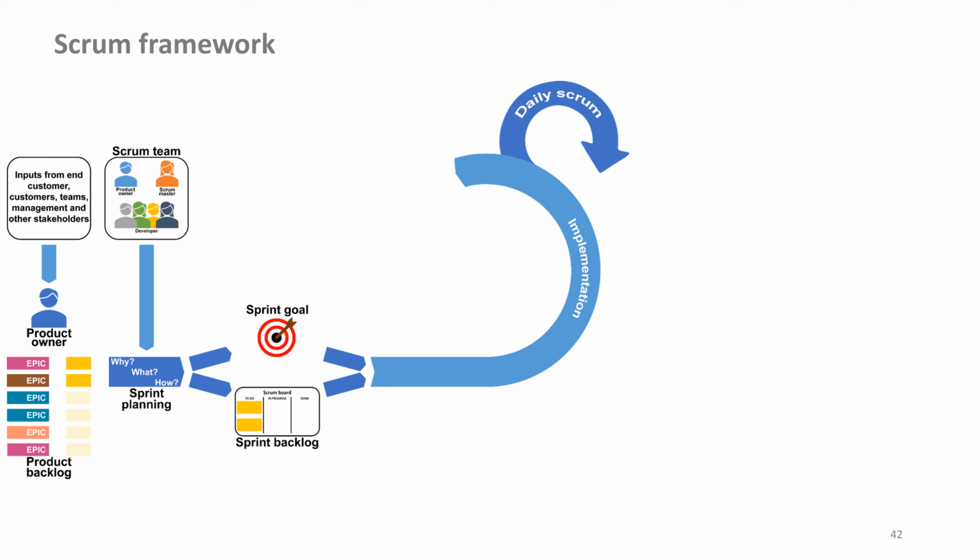There are cases where, for example, an urgent bug fix needs to be included. For this reason, the sprint must not be terminated. It must be evaluated whether the sprint goal still makes sense. Individual work packages in the sprint backlog can be exchanged for work packages of the same size. In practice, this often happens. It should not be the rule and should be the exception.